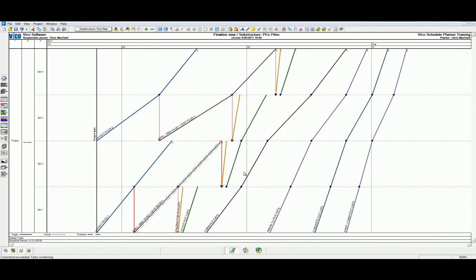As you can see, we're suggesting that we're now going to have two surveyors to lay out the piles and two drilling rigs to complete this phase of work. Overall, we have gained additional time, but by only adding extra resources.